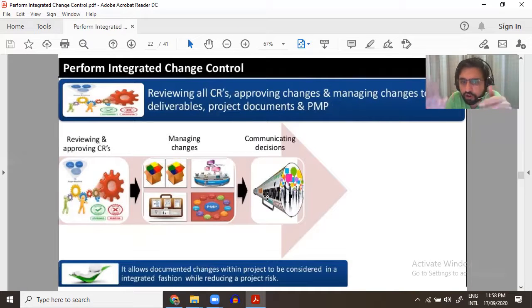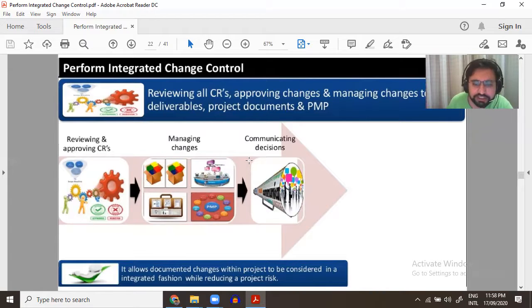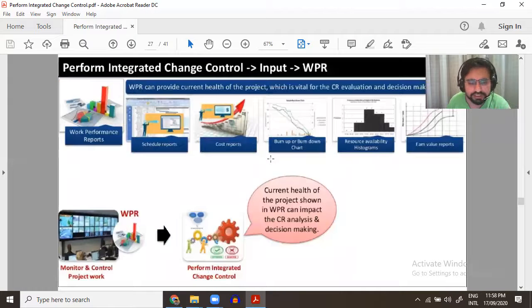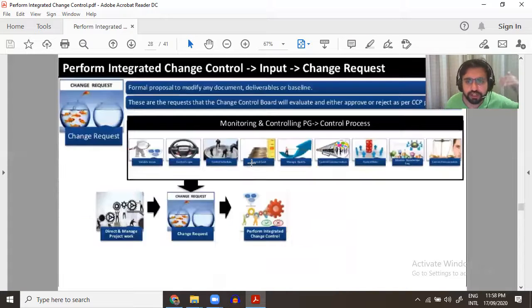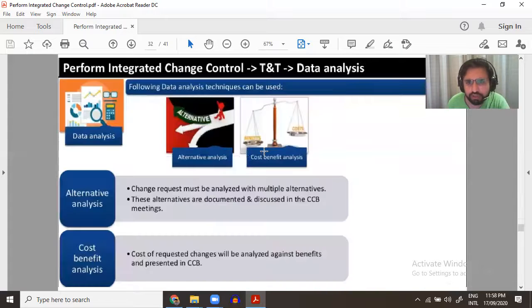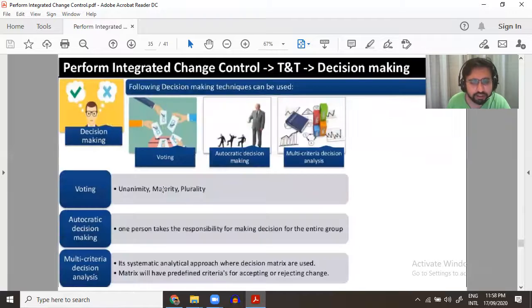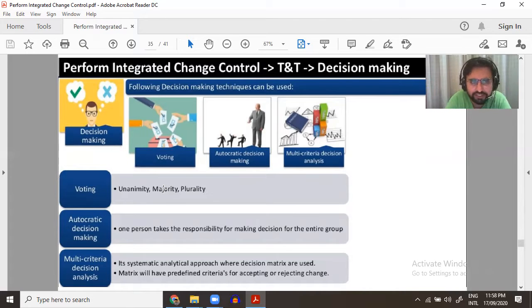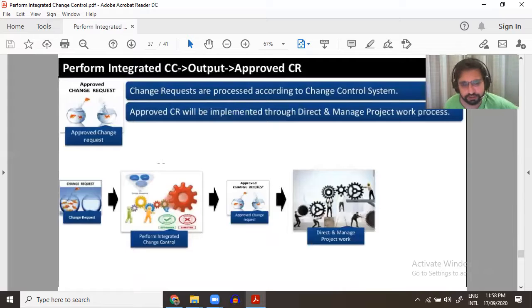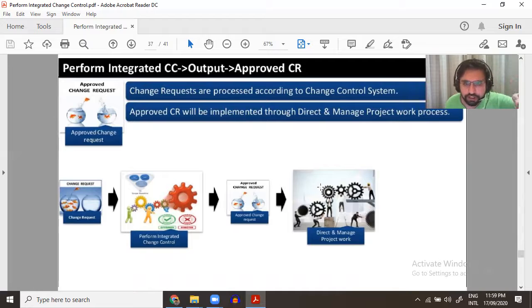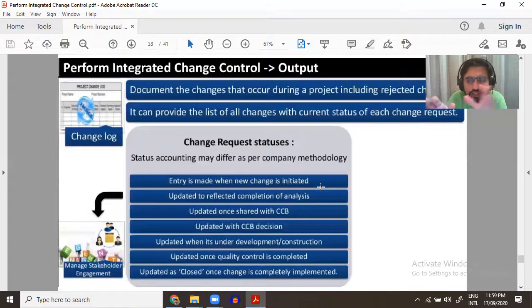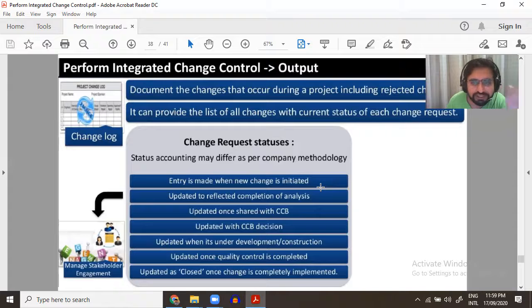The major purpose of this process is reviewing all change requests, approving changes, and managing changes to deliverables — review, manage, and communicate changes. The most important input is the work performance report, along with change requests, change control tools, data analysis, expert judgment, and meetings. Decisions can involve voting, autocratic, or multi-criteria approaches. Approved change requests go to Direct and Manage Work, quality control, and control procurement. Outputs include change request status updates, which are shared with stakeholders, and updated documents.